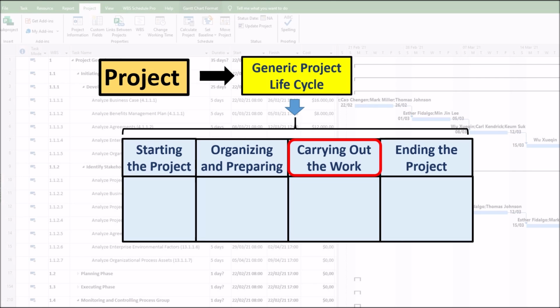The execution or implementation stage is the third stage, and at this point the deliverables are physically built. The person or group assigned to carry out a task will need to know, in detail, what the task involves as well as any dependencies and timescales. At this point, a group of management processes are being used to monitor and control activities, focusing on time, cost, and specification measures to ensure acceptance reviews are passed.